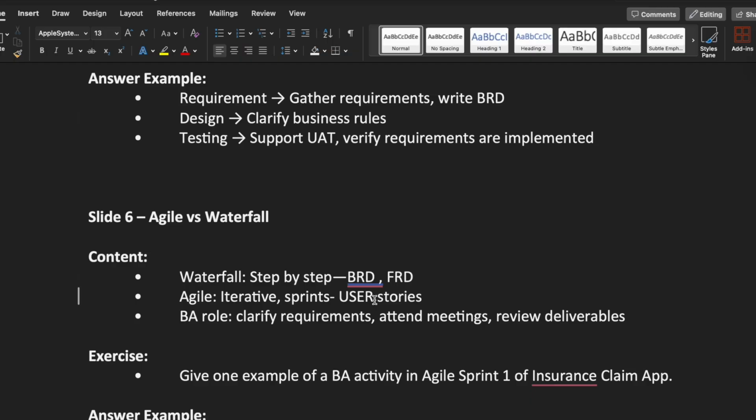Before we start a sprint, we plan it. Say one developer says, next week I will not be here, I'm going to take a vacation. So we plan around it: only two developers are there, and each one can take only two user stories, so four user stories. If there are three testers and the third tester doesn't have work, then we ask, can you do something else?